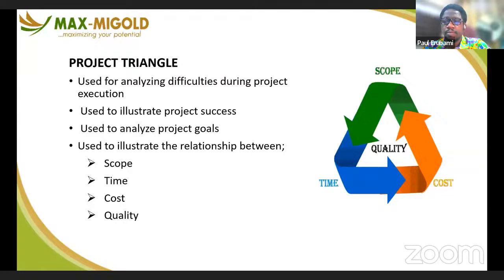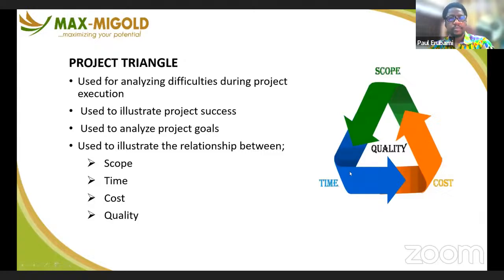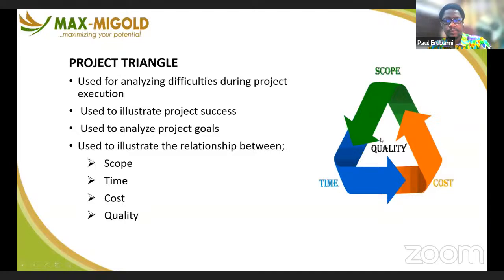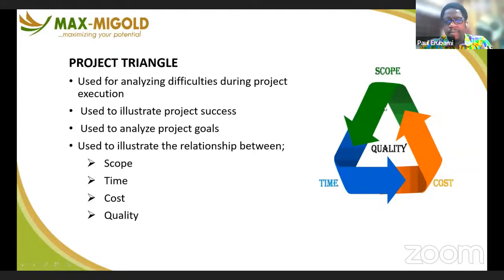Immediately a project contract is signed, it goes into this triangle — the equilateral triangle, which means all the sides are equal. The scope is agreed, the time is agreed, the cost is agreed, and the quality of delivery is agreed. So everybody knows exactly what they are expecting. At any point in time, if any of these elements changes in the project, it will affect the quality of delivery. If the scope increases or reduces, it will affect quality, cost, and time.